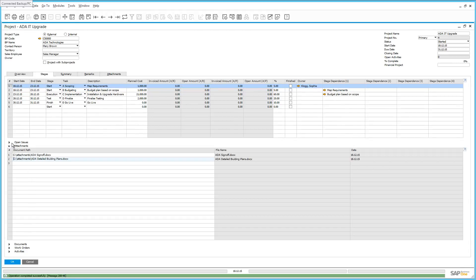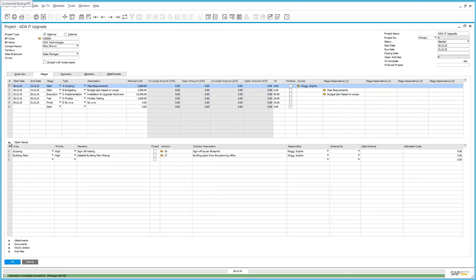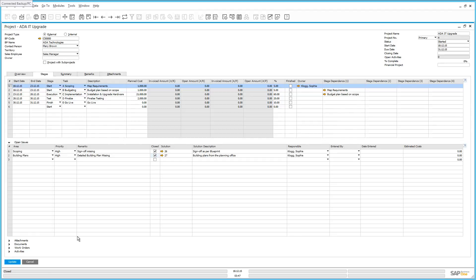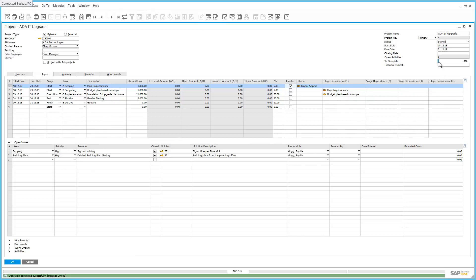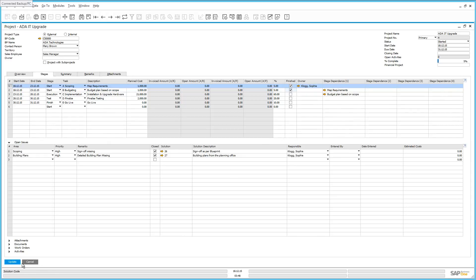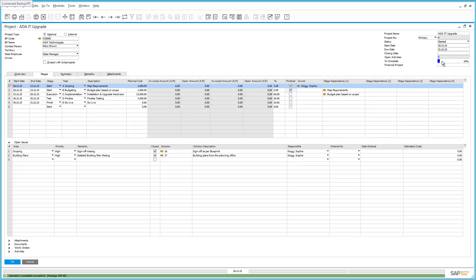I can also then go into the open issues list and then I can mark these open issues as closed, given that we've received the information that we need to close off on this stage. Now that we've finalized the first stage of our project, we can tick the finished checkbox. And then if we update our project window, we can see that the percentage complete field has been updated to reflect that 5% of the project is completed. In addition, we've also completed the budgeting phase of this project. And we can update the project window and also see that now the project has been updated to reflect that it is 10% complete.